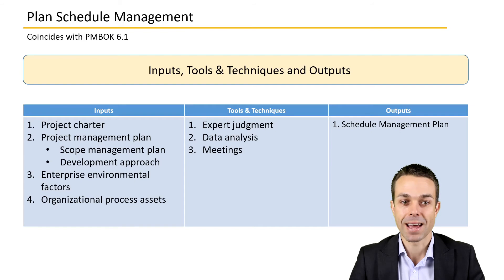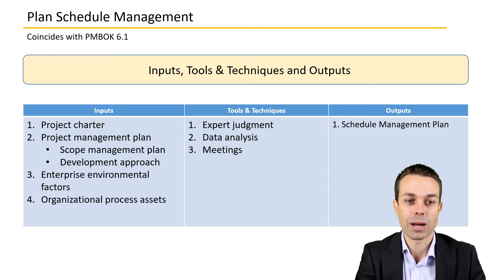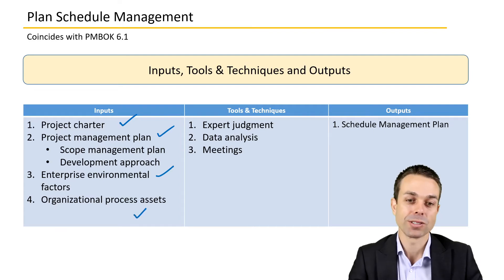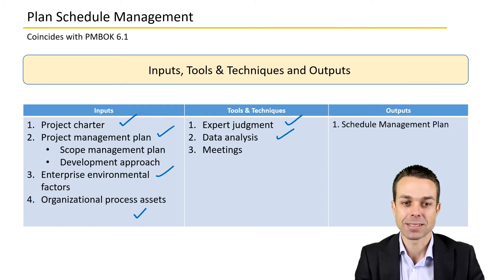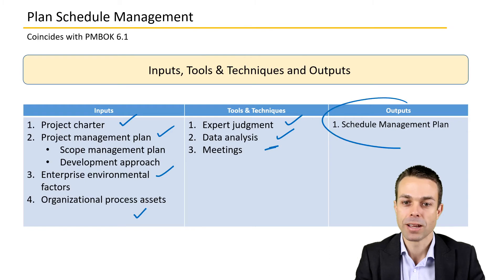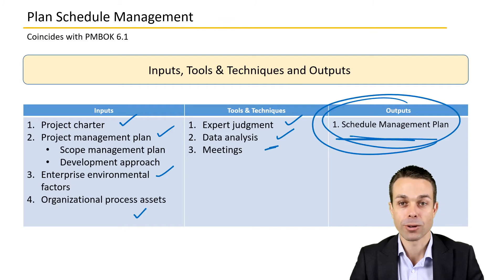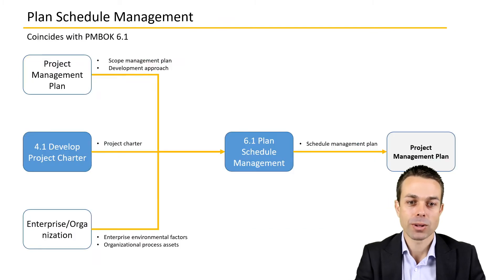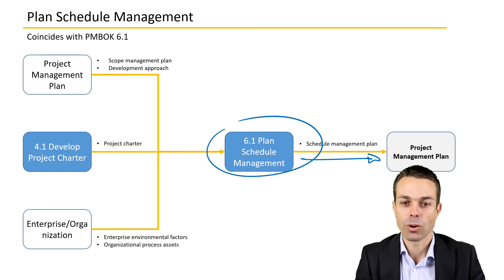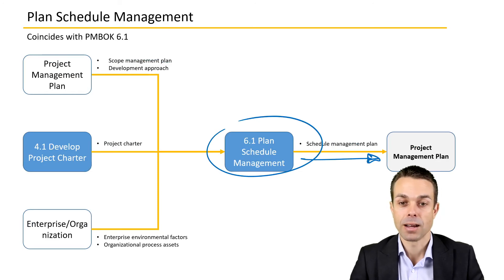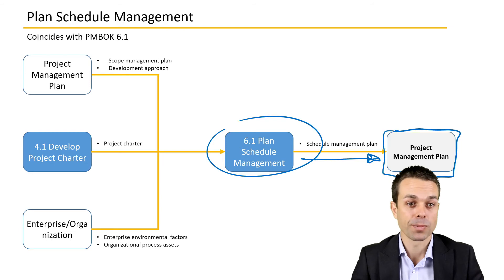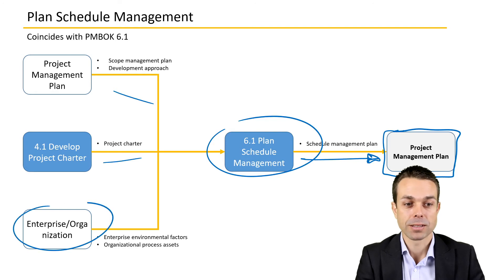For inputs, tools and techniques, and outputs of Plan Schedule Management: we've got our project charter, the project management plan, EEFs, and OPAs. Tools and techniques include expert judgment, data analysis, and meetings. The output is the schedule management plan itself — the process we're going to be using for managing and controlling our schedule, which also feeds into other project management plan components that we'll need to update and change over time.